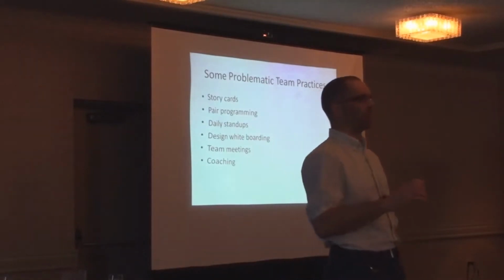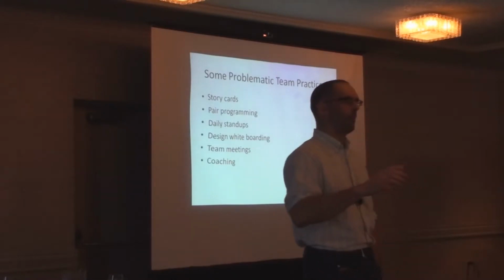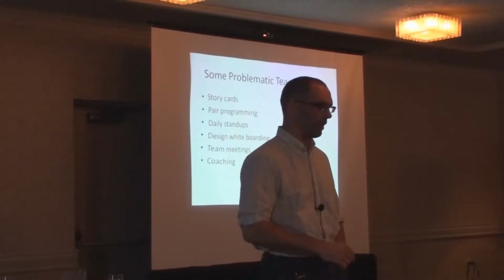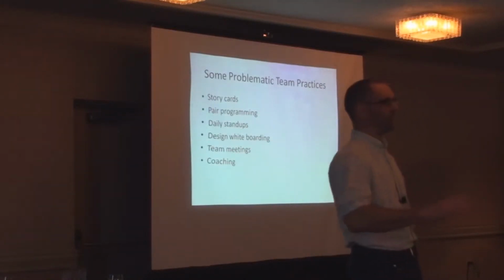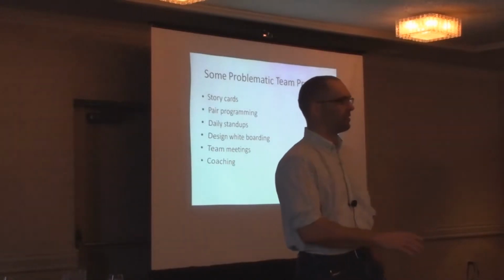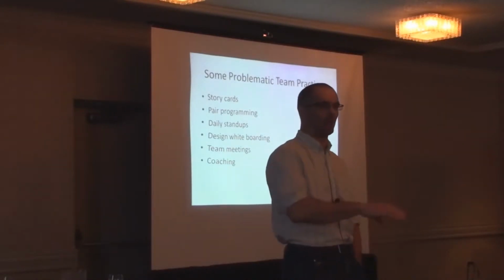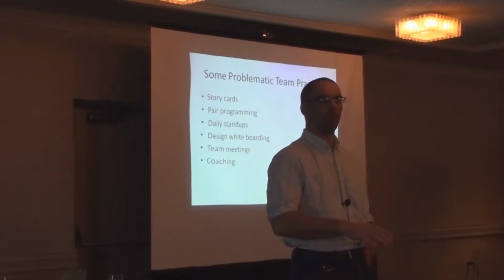And then essentially, for the first half of that project, so for several months, basically after stand-up we would clear up any other stuff we had on the parking lot, and then we would spend another half hour just talking about various things we were designing. So it was basically another standing meeting every day where we cleared up all the issues with all these story cards and bits of the architecture that people just didn't understand across the board.